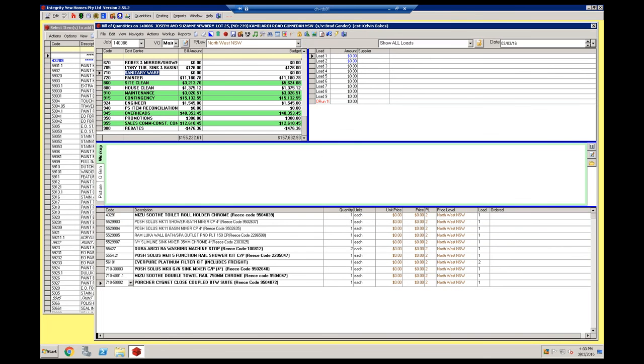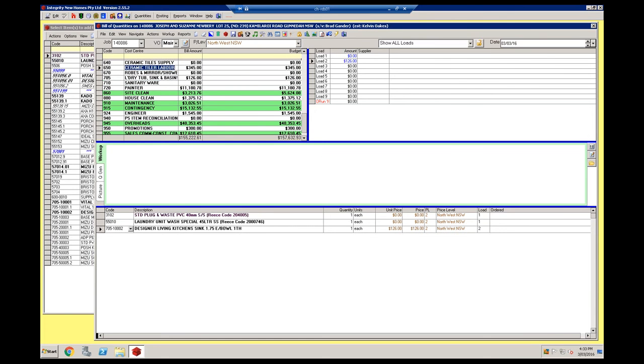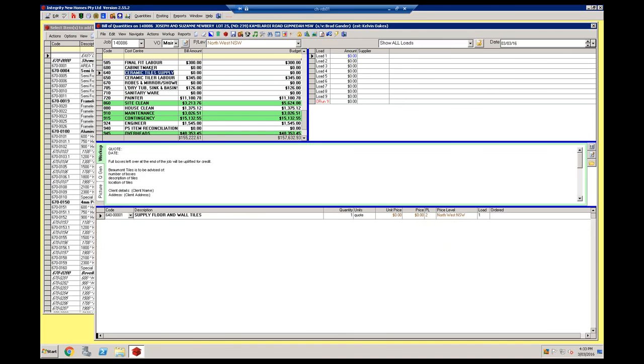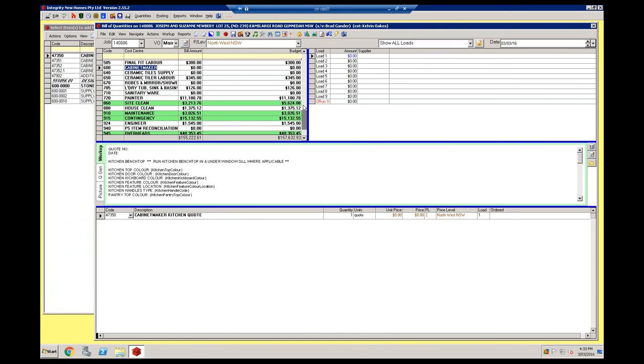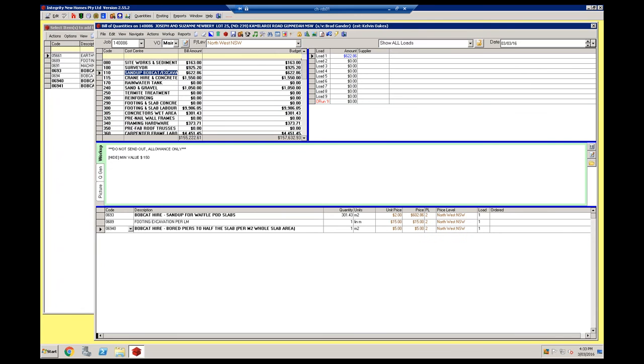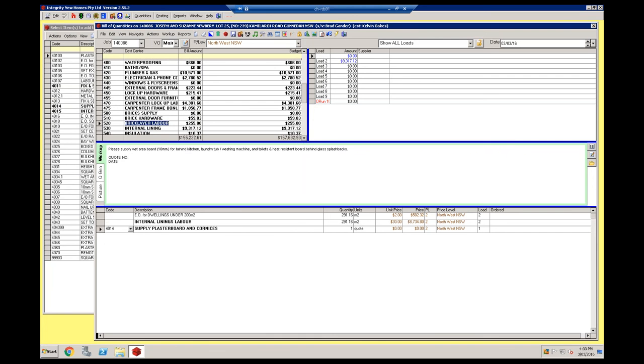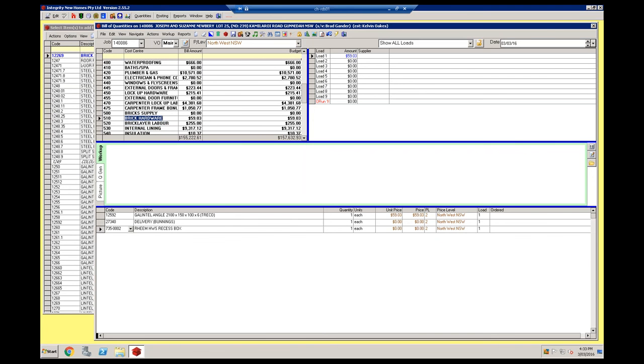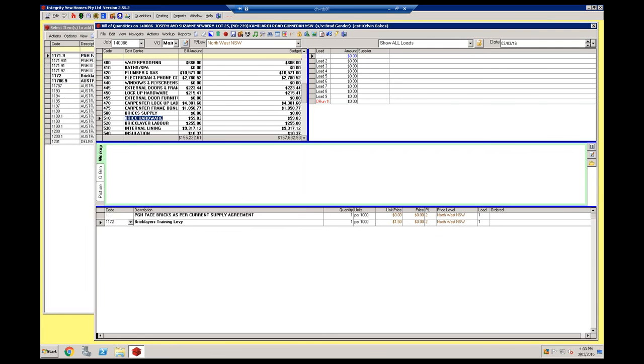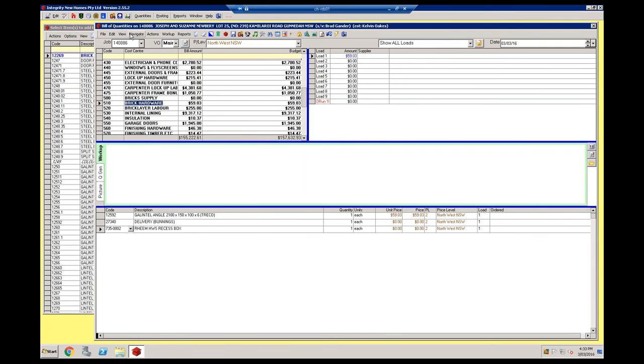So we now have a bill of quantities that we can adjust as per the color selection or as per the client's selection in terms of roof coverings, wall coverings. Obviously the brickwork isn't applicable in this instance. Because we put 0 in, or these items that come in with just a quantity of 1, you could very easily delete out anything to do with bricks right now and start adding in the cladding.